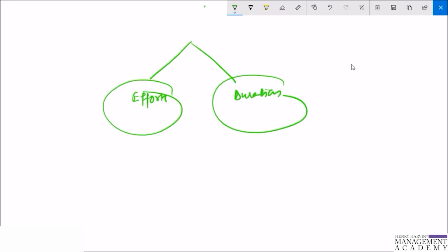So we have learned that we have to estimate when we are supposed to do the planning meeting. There are 3 places where we can play the planning poker game. First, there will usually be an effort to estimate the large story items before the project officially begins or during the first iteration.